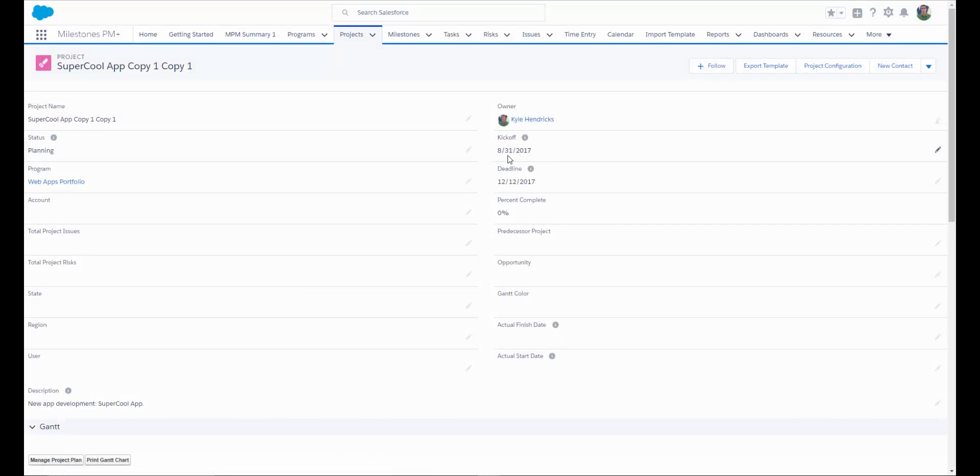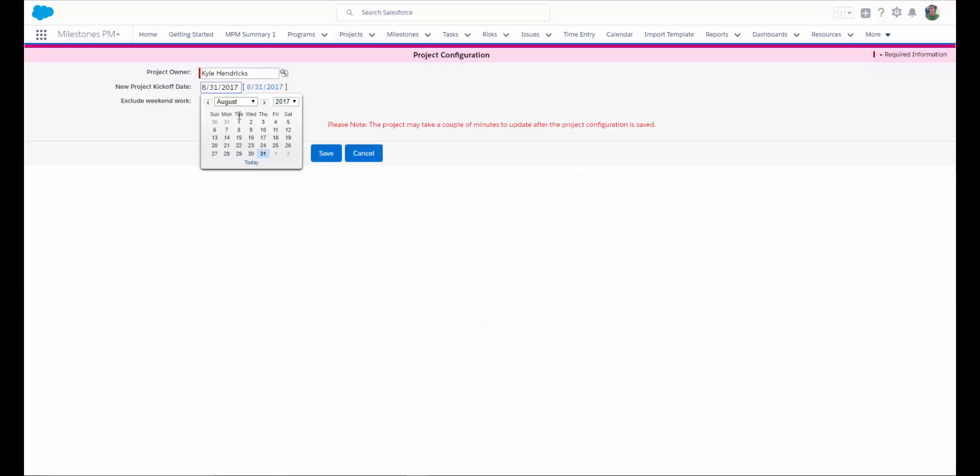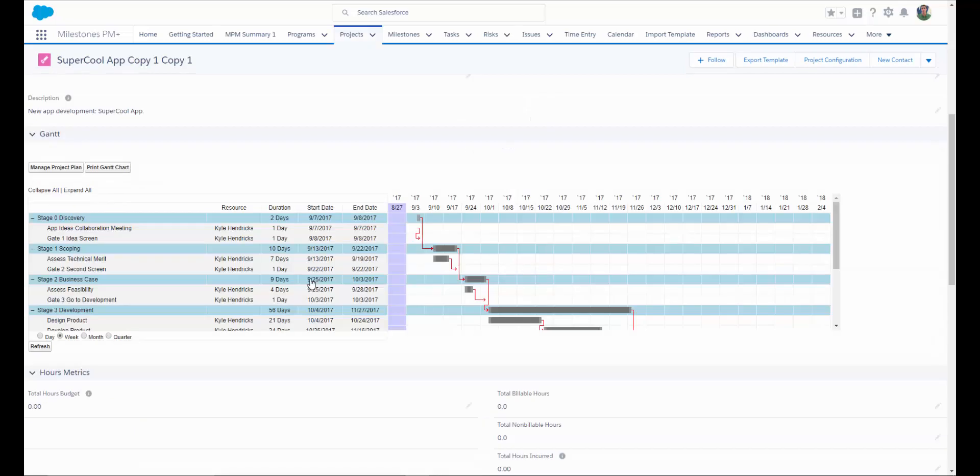If you've just created this project from a template and find that you need to shift out your kickoff date, you can use the Project Configuration button. Select your new date, exclude weekend work if desired, and select Save. Once the page has had time to refresh, you can see that your entire project has been shifted out for you.